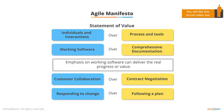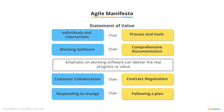Working software over comprehensive documentation. Documentation here refers to things like status reports, progress reports, and detailed specifications, which do not really demonstrate any real progress or value. Therefore, the emphasis is on working software that can be delivered and demonstrated.